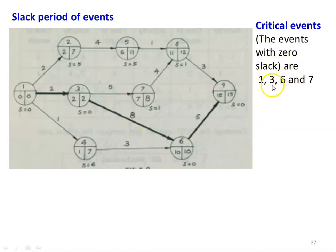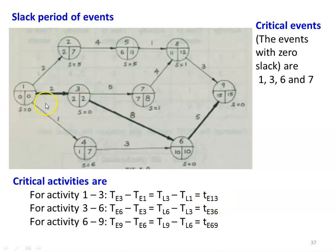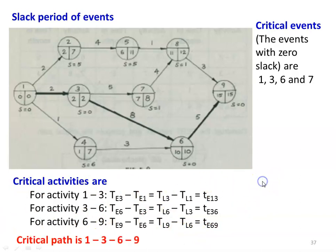The events with zero slack are 1, 3, 6, and 9 — these are the critical events, and the corresponding activities are critical activities. The critical activities are 1-3, 3-6, and 6-9. For a critical activity, the condition is: TE3 minus TE1 equals TL3 minus TL1 equals t(1,3), and similarly 3-6: TE6 minus TE3 equals TL6 minus TL3 equals t(3,6). The critical path is 1 → 3 → 6 → 9.